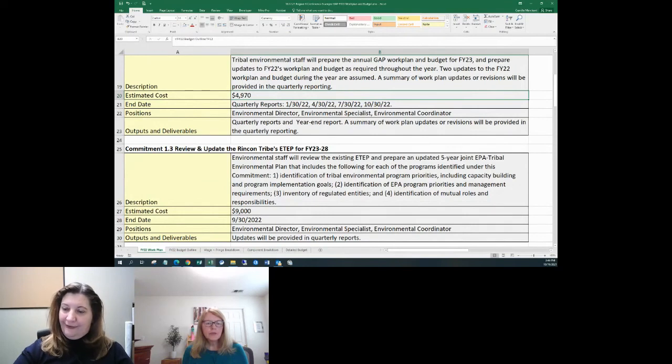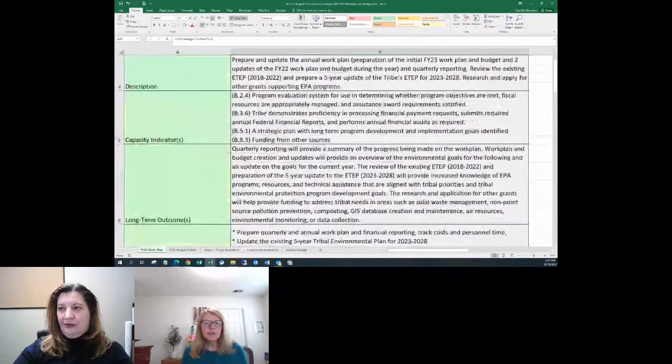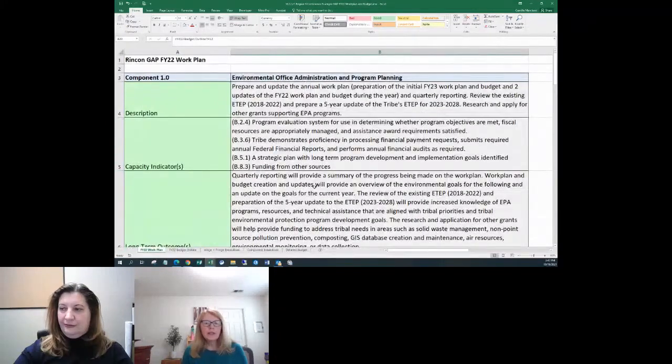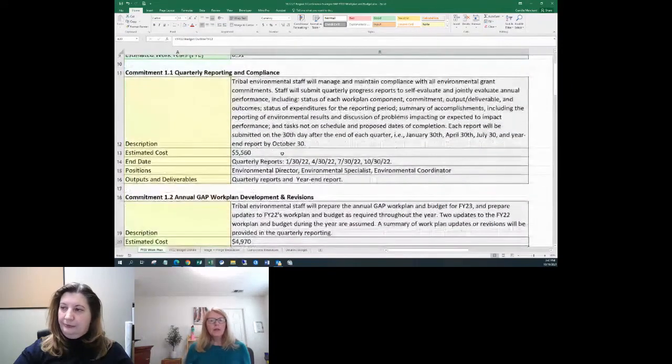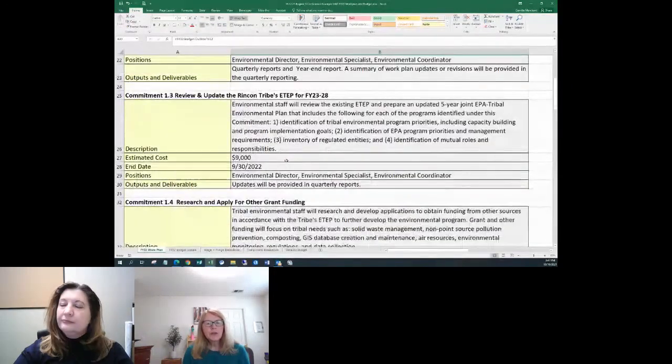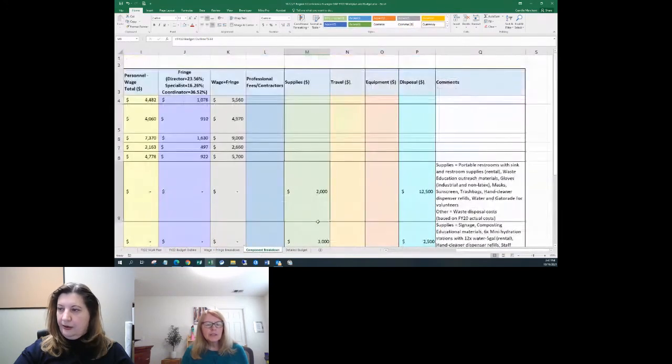And I think this has really helped you in the past when, especially say during FY20 COVID hit, some commitments couldn't be done. Some of the cleanups where there might have been a big lump sum tied to where you'd look, the middle of the year and go, we're not going to be able to do this year. So you can just move those costs. You can add something new that you want to do in a new and different way remotely or something like that, and make those adjustments easily.